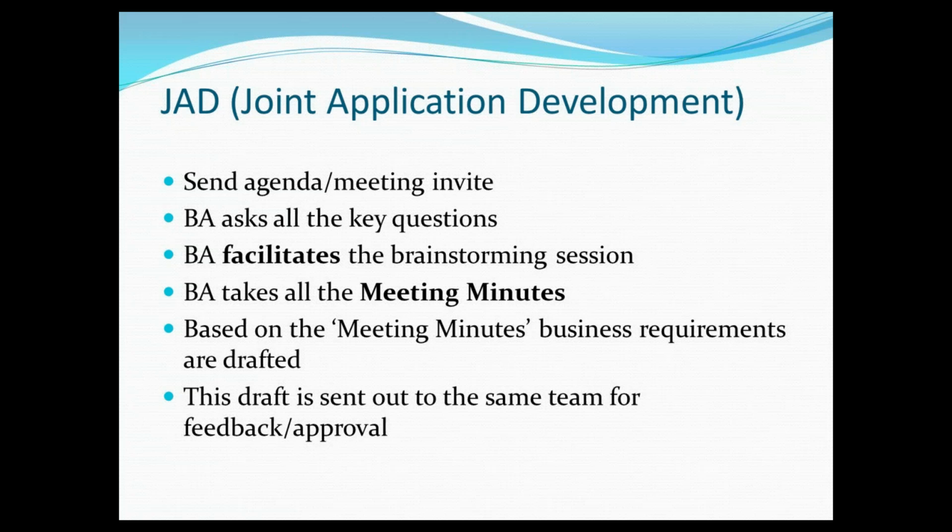At the same time, you are the guy who will be taking the meeting minutes. Based on the meeting minutes, you document business requirements. Once they're documented, you send out the document for approval. Approval from all the key players who attended that meeting. Maybe initially it's not approval. Initially it's just their feedback, but approval will be given by your leadership. Once everything is all said and done, once you have a robust set of complete business requirements, your leadership will sign off, and then you can proceed.